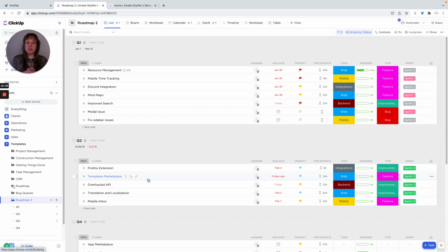Also the time estimates, you can update those, and you just click here to update whatever that time is for you. And then if you have the time, in order to use time estimates, you do need that ClickUp set up. And then you can also do time estimate rollup, which then you can add time estimates to subtasks, and then it'll show the overall time estimate for that plus the subtask. So the main task plus the subtask.